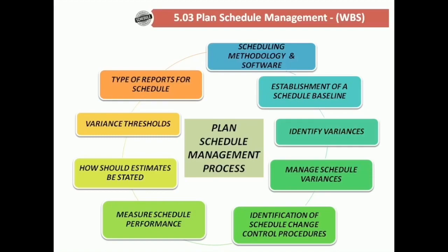The last thing listed here that needs to be present in the schedule management plan is the type of reports for schedule. Will you use a bar chart, activity list, network diagram, or what are the other types of reports that you will use for schedule reporting? This must be defined in the schedule management plan during the plan schedule management process. Guys, if you have created a solid schedule management plan, you will be ensuring the completion of the project on time.